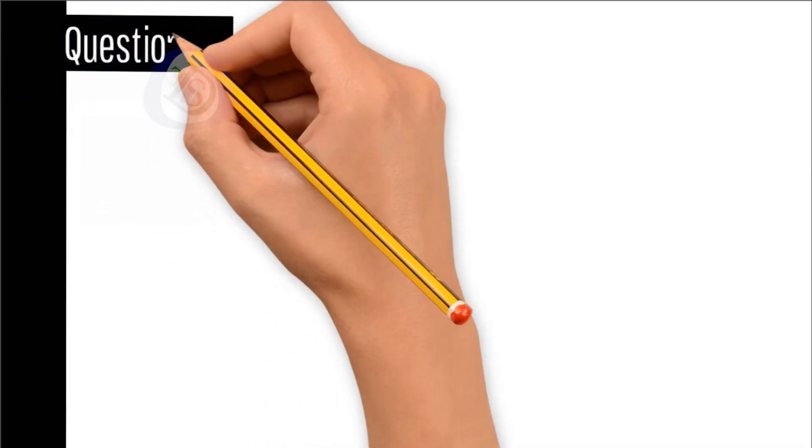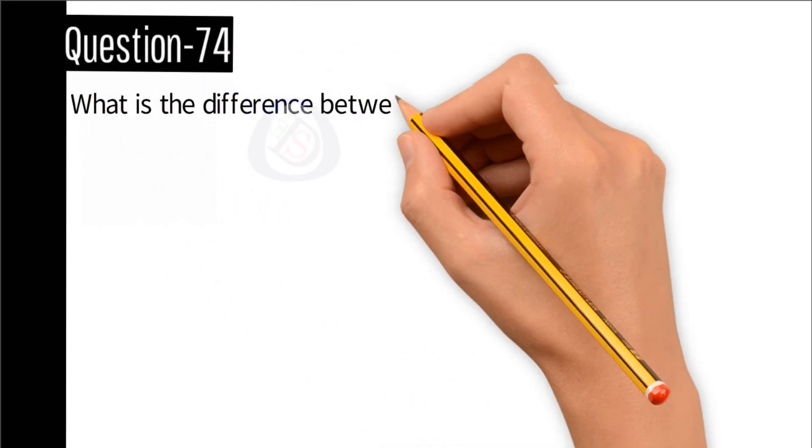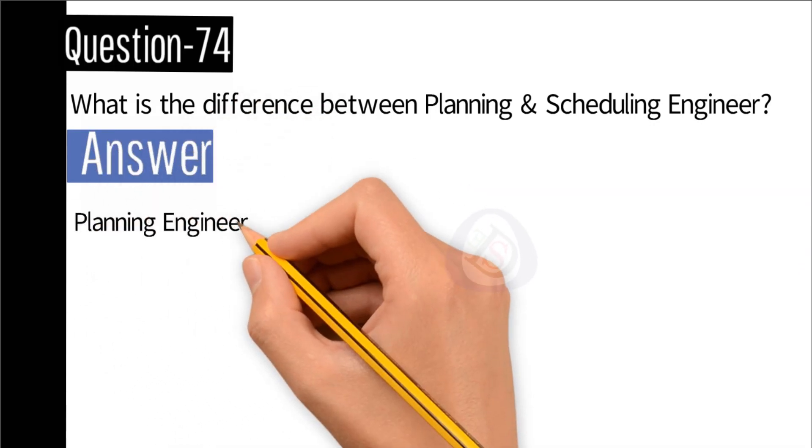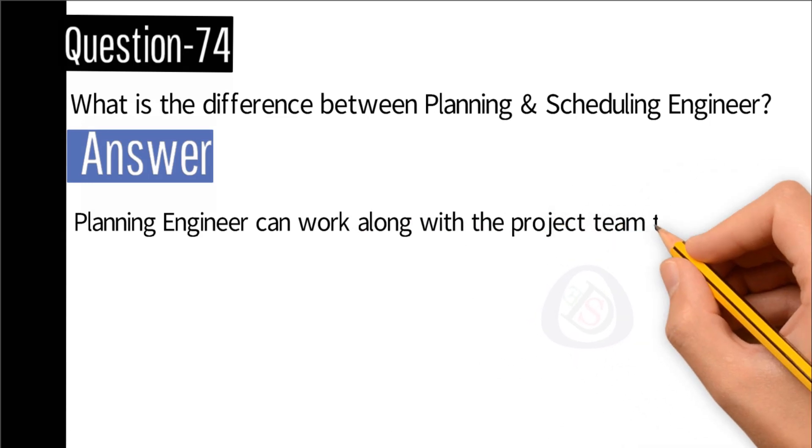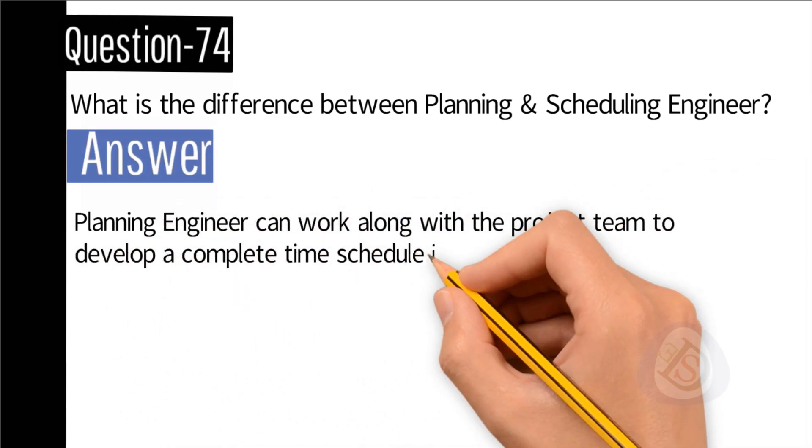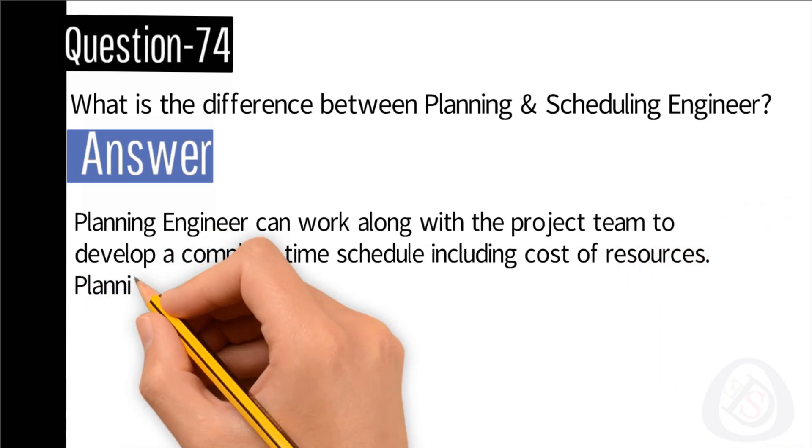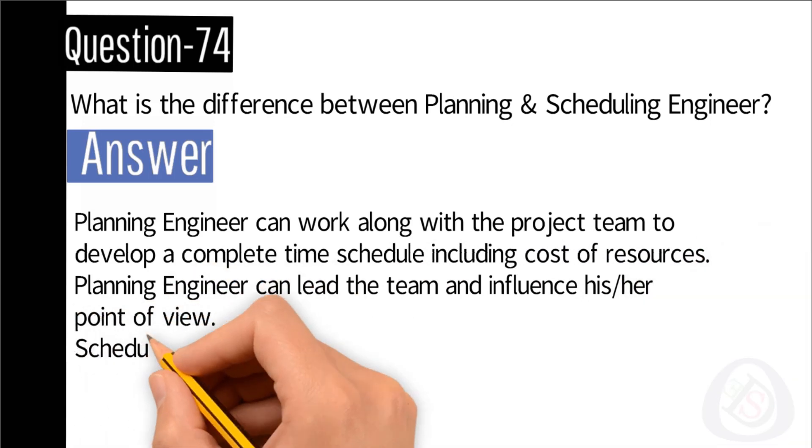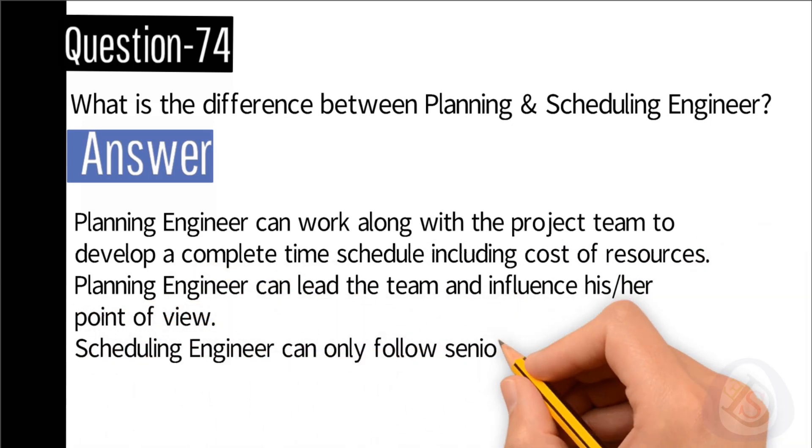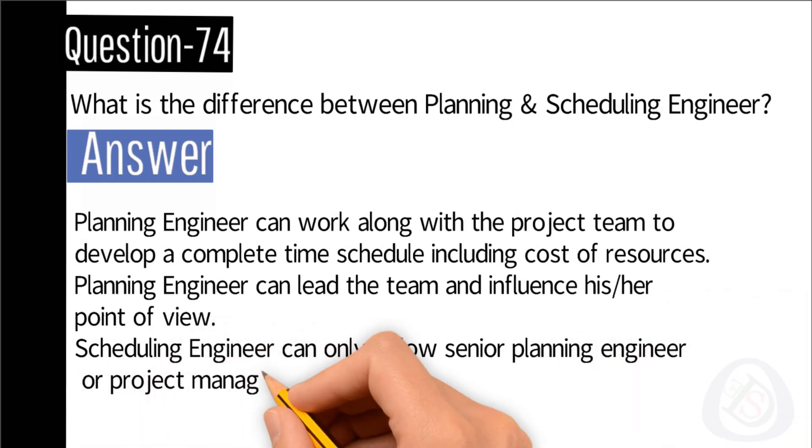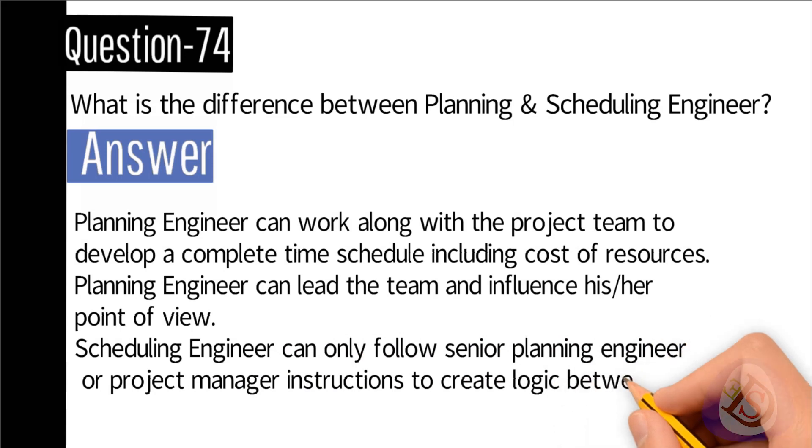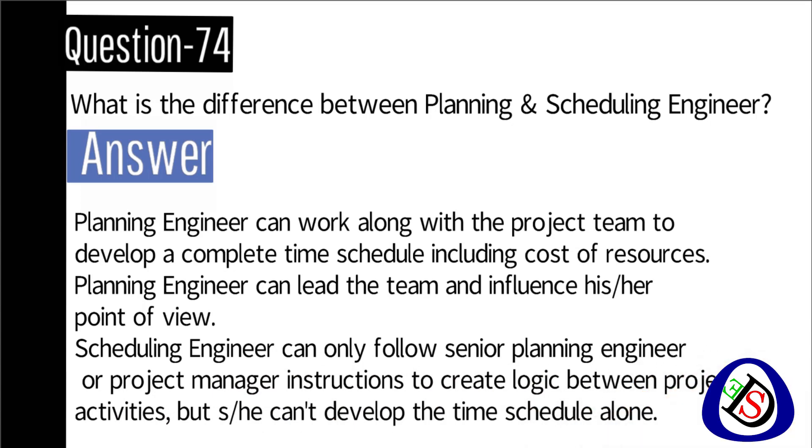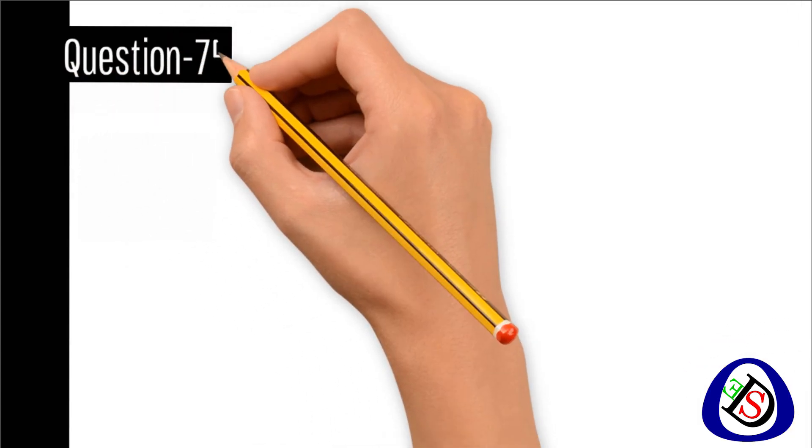Question number 74: What is the difference between planning and scheduling engineer? Answer: Planning engineer can walk along with the project team to develop a complete time schedule including cost of resources. Planning engineer can lead the team and influence his or her point of view. Scheduling engineer can only follow senior planning engineer or project manager instruction to create logic between project activities, but he or she cannot develop the time schedule alone.